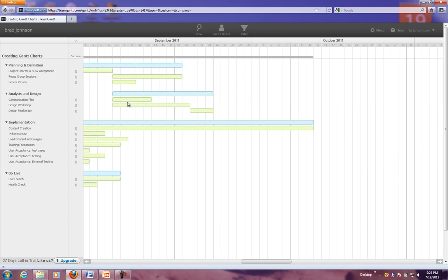Let's say that we don't have that many resources. So the person who's doing the focus group sessions will also do the communication plan. That means the communication plan has to come out here. Let's get there.